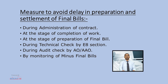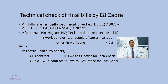During technical check, E8 section shall ensure that all documentation is complete. E8 shall also try to settle observations raised during technical check by personal contact with the engineer in charge concerned. Frequent meetings with AO will help to settle observations during audit check by personal discussion. Monitoring of minus final bills on priority basis will also help to avoid delay in final bill settlements.